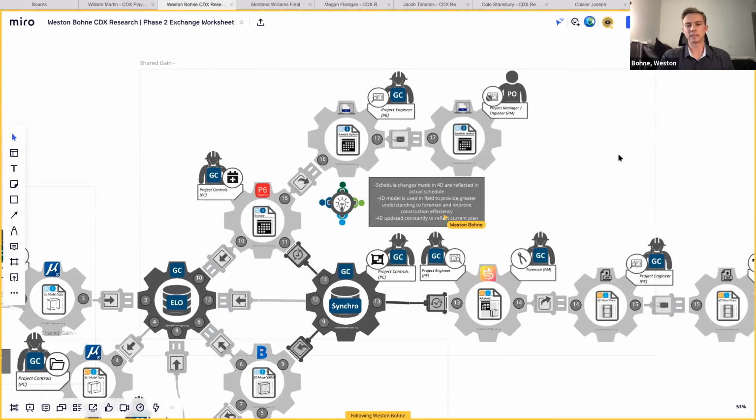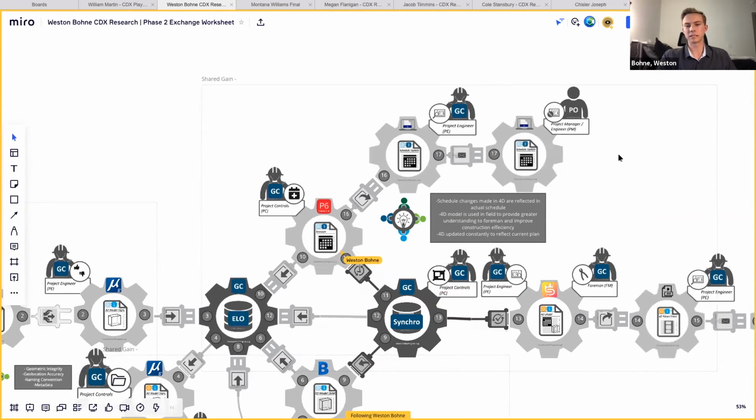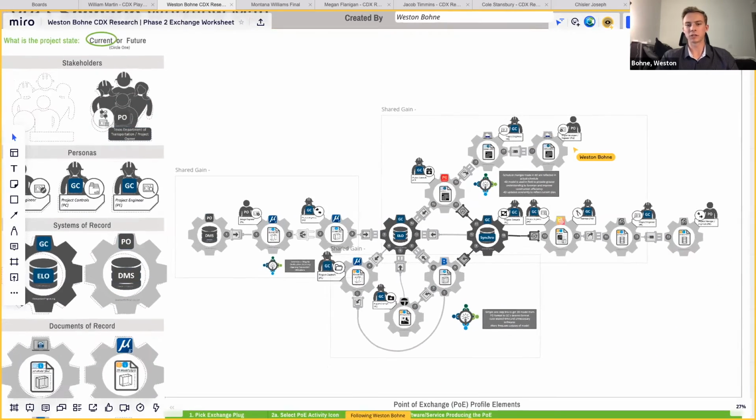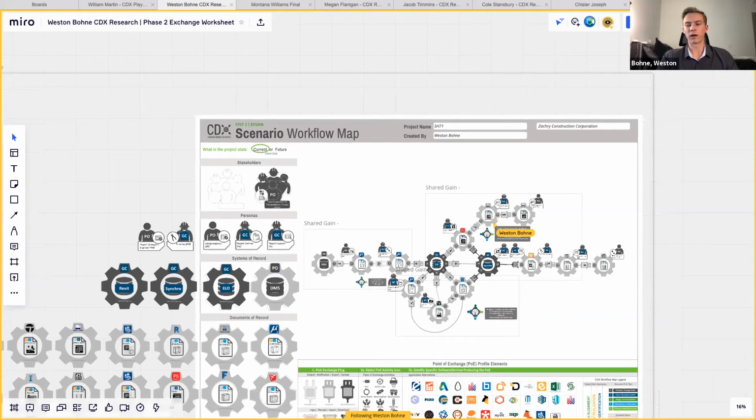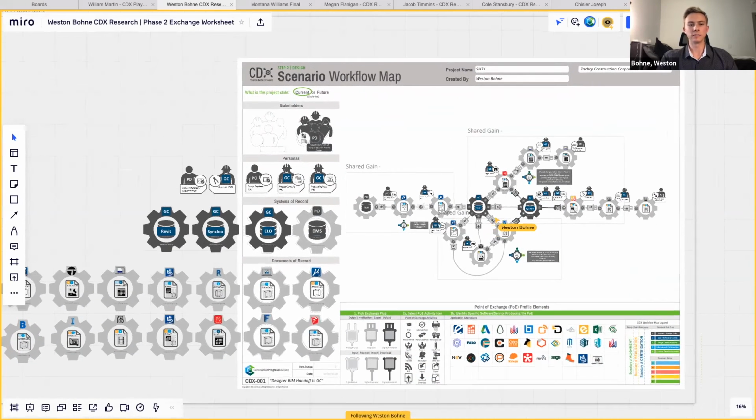And then you can see that Synchro directly links with P6 Primavera. And so that allows for project controls to hand that off to the project engineer, and they can export the XER project or the XER schedule that's required contractually and make that handoff to the project owner for final approval. So it just allows for a much cleaner, much more accurate workflow altogether. And it means that the 4D model is finally being used in the way that it's intended.